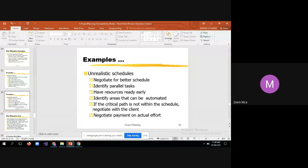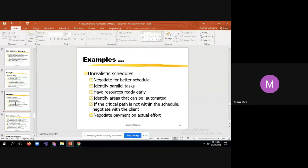The next example is unrealistic schedules. Unrealistic schedules are prepared when a project manager or technical lead does not have sufficient experience in that domain — that is, developing similar projects. The solution is to negotiate for a better schedule. For example, if you are a software engineer and your team lead gives you four days to implement a task that requires one full week, you have to negotiate, convince them how critical it is, and take extra time.